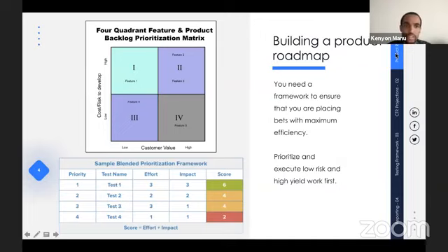And the whole idea here is that I think this is good to have as a group process, and having this as an X and Y axis allows you to put things in a position and get the group's opinion on what we think is the most valuable and what we think is the most complex to execute on. And putting that in a chart allows you to view all of your projects relative to each other. So one project might seem like it's extremely risky to do, or is extremely valuable.